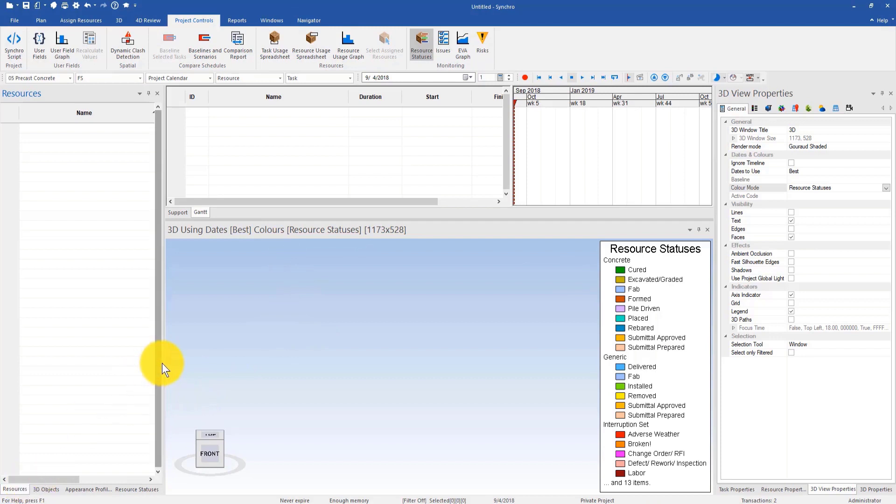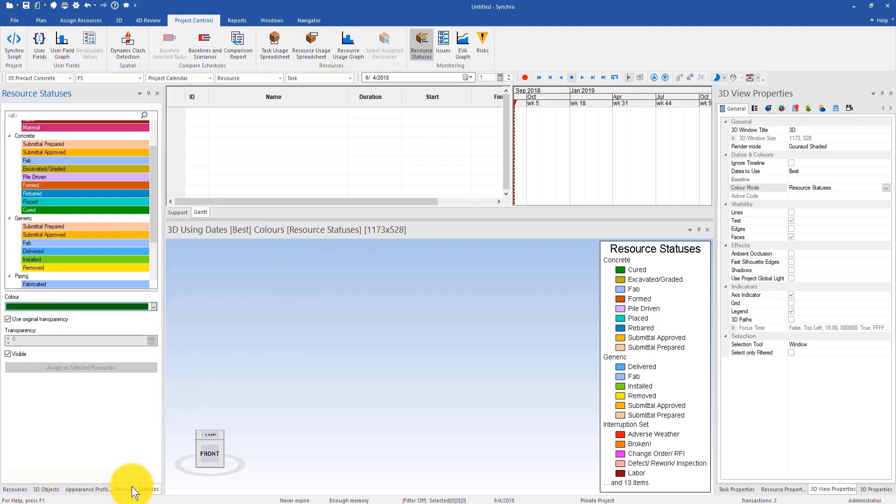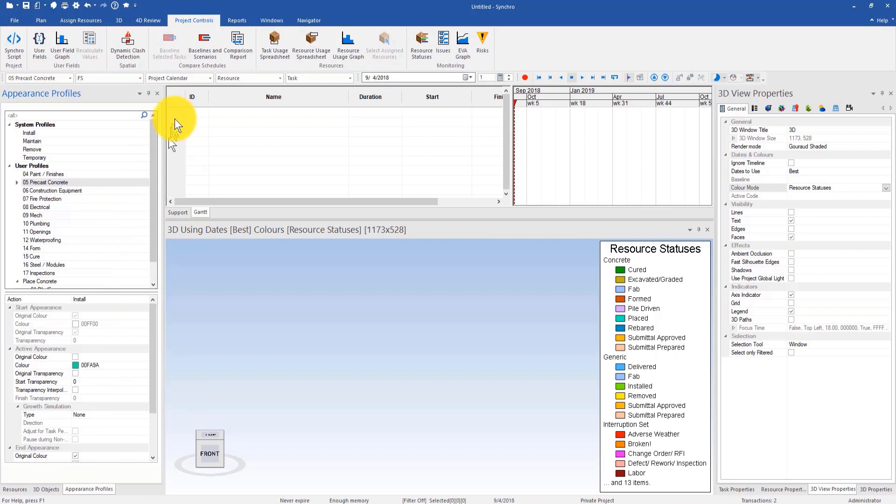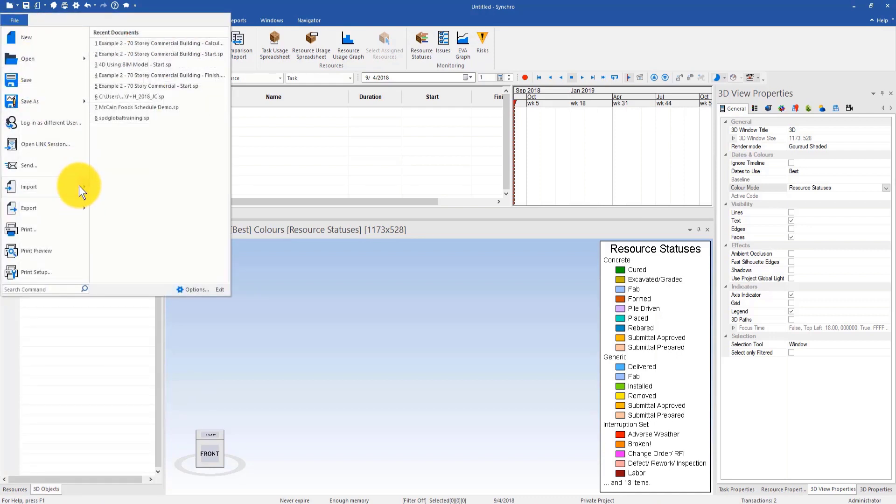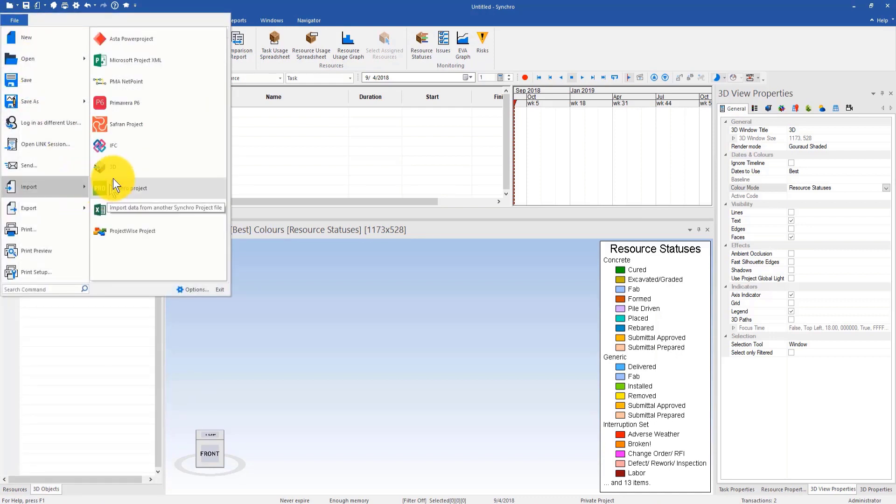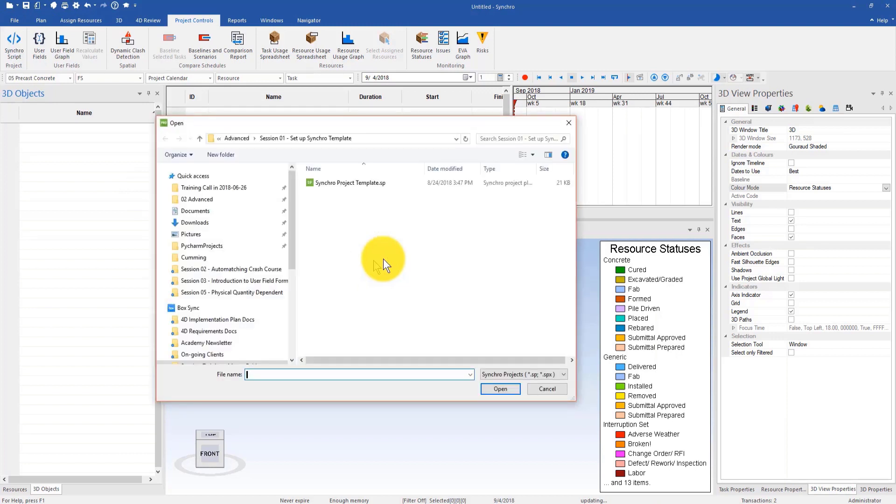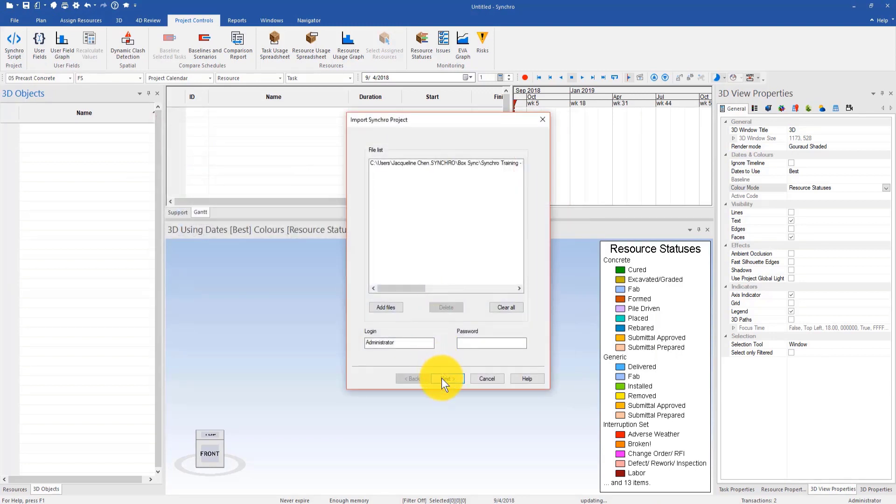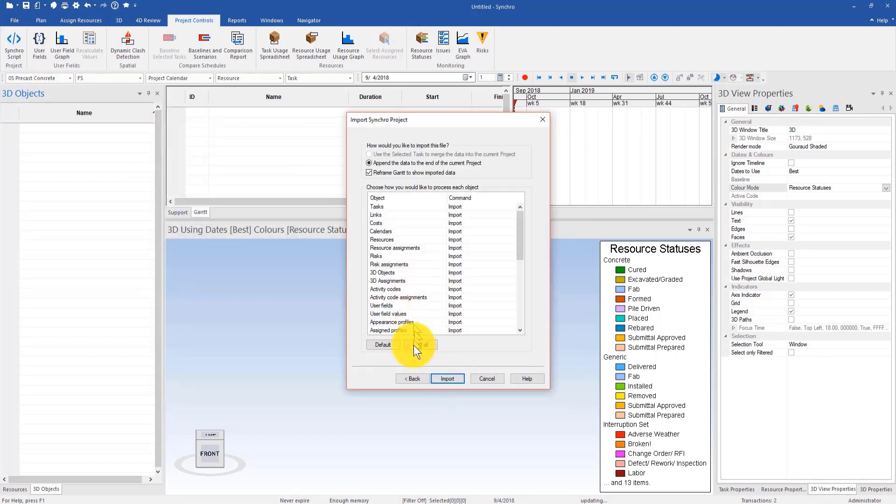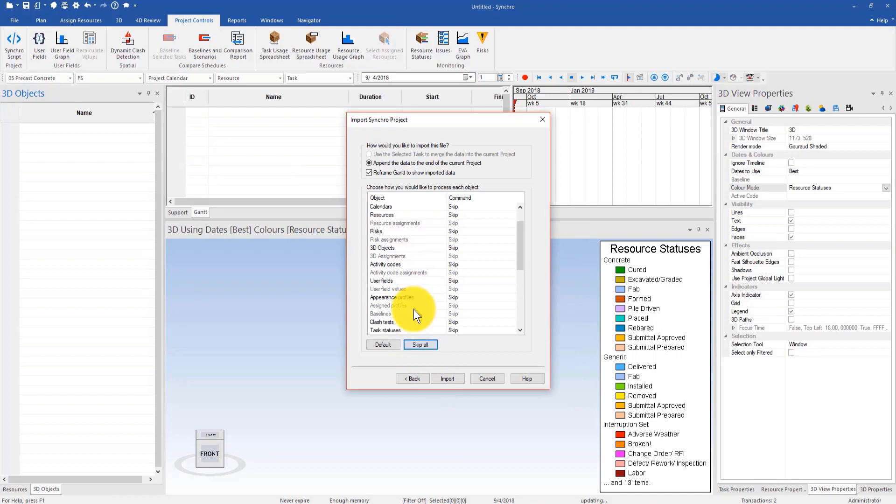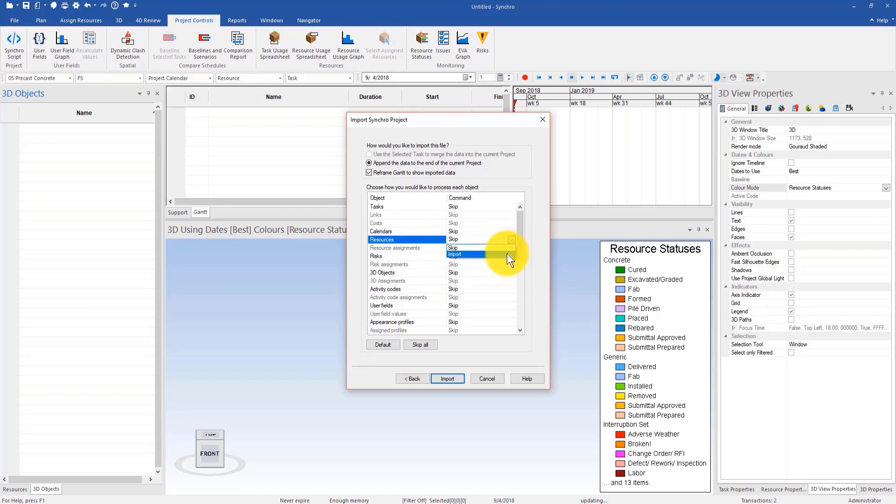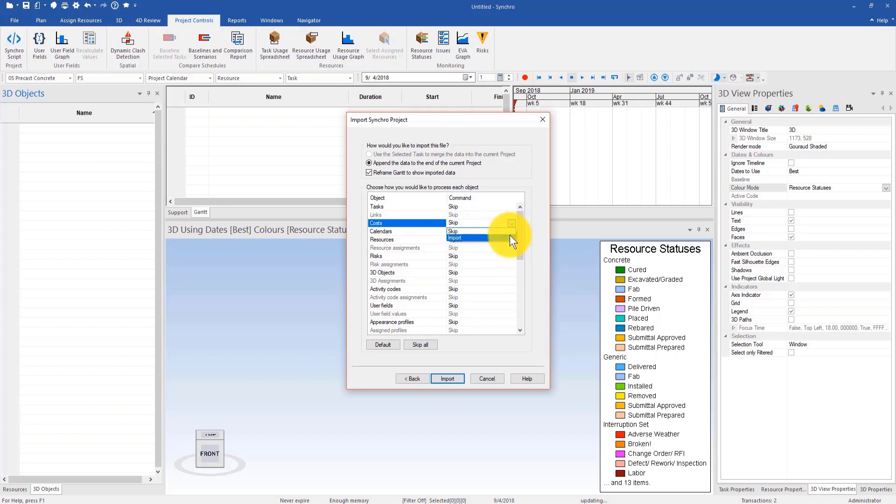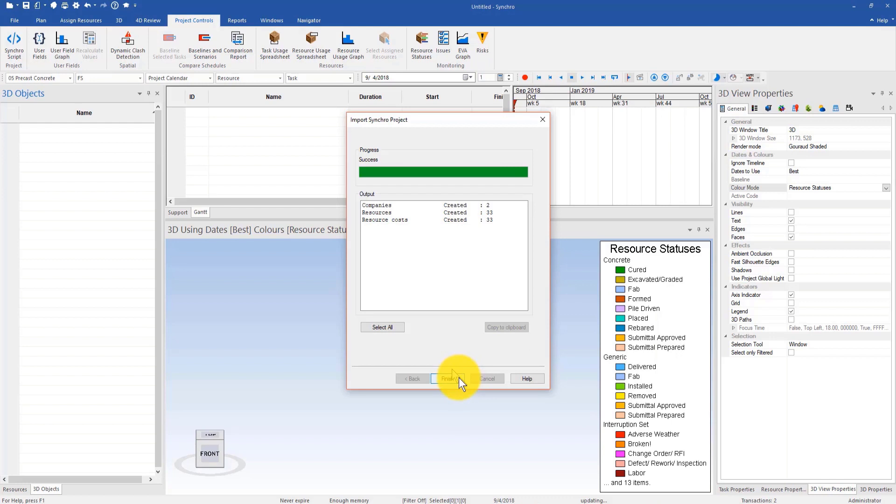In addition to resource status and appearance profiles, we can also import resource cost from another project. To do that we can go to file import, import Synchro project, Synchro project template, and then click Next and skip all. Then here I can import two things that I think are needed. First thing is resources, the other thing is cost because those resources come with their unit cost or unit price. After that I can click import and hit finish.